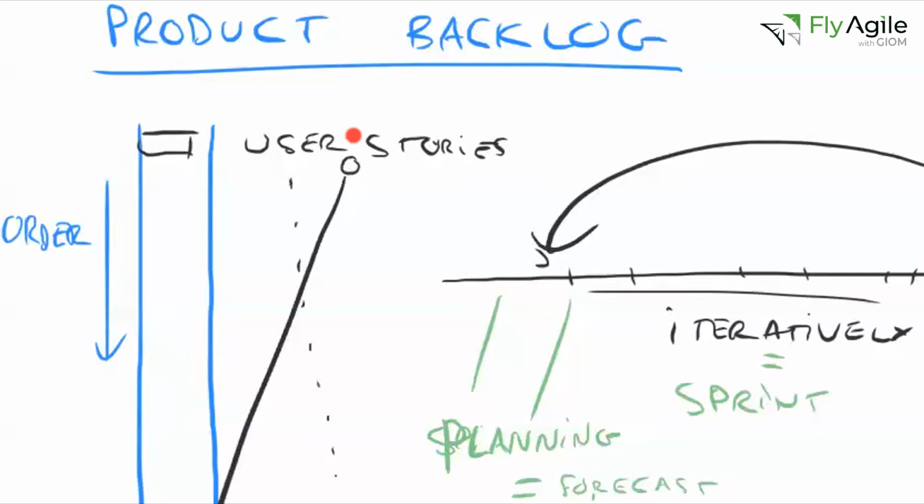That user story can be enriched while you work, while it moves through the Kanban. It's okay. You can add and refine acceptance criteria. The only thing is, we consider it good enough to start when we have just enough detail, or we think we can figure out the details on the way, and we will enrich the user story with that.